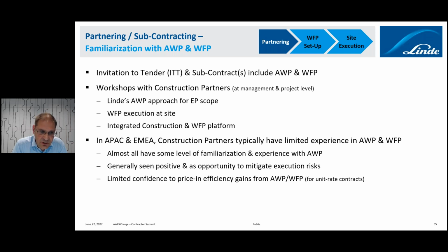Where we see an issue is, of course, that at the end, because we work mostly with unit rate contracts, we so far still face limited confidence by our construction partners to price in efficiency gains from AWP and work phase planning. And this is definitely something which we need to change, which we need to discuss further, because at the end, we can only end up in this win-win situation, which I've explained before, if you really get this also aligned with the contractor. And I think this will gradually definitely be more in the focus.